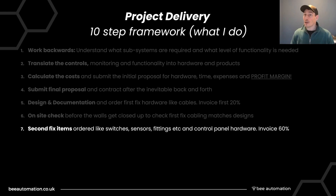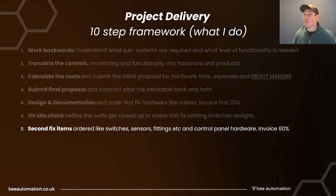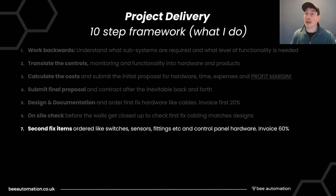Depending on the project, I may keep the second-fix items in storage and deliver them to site when commissioning begins, or I may send the field peripheral devices to site early for second-fix installation and offline commissioning — if the installation team is competent enough. However, all the control panel hardware stays with me off-site.